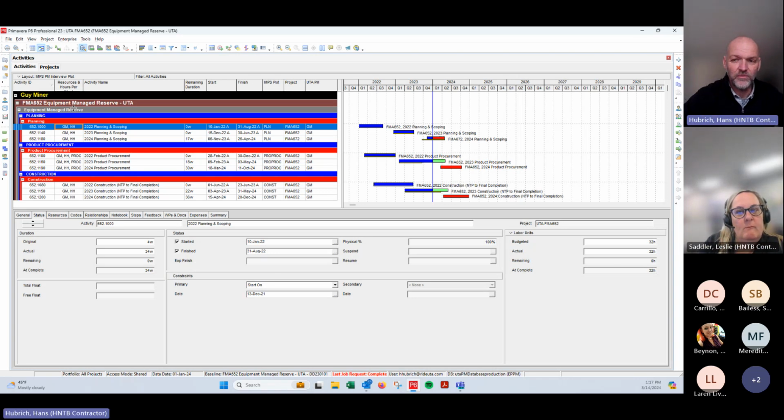For me, with the FMA project, it hasn't gotten to the point yet where it's useful to actually schedule every project in P6. Because, for instance, this FMA 652 project, last year we had 32 projects that got completed under FMA 652. And if I were to go in and try and schedule a procurement activity, construction activity, and a closeout activity for every one of those, I would do pretty much nothing besides P6 all week long.